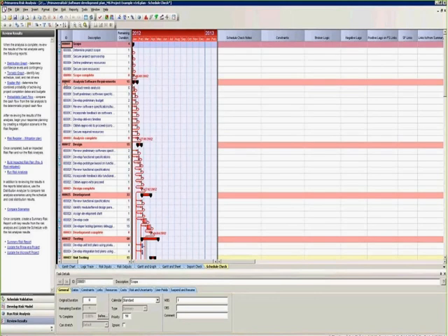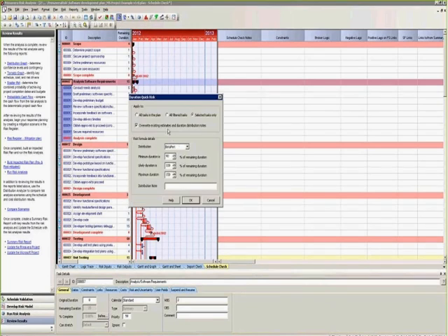Now, what we'll do is we're going to add some risk. And what we figured out is over here, the analysis part has its own little option. So we're going to overwrite. We're going to take these selected tasks, and we say that there's a 90% chance that the minimum is 90% of whatever we figured it was going to be, and then 150%.